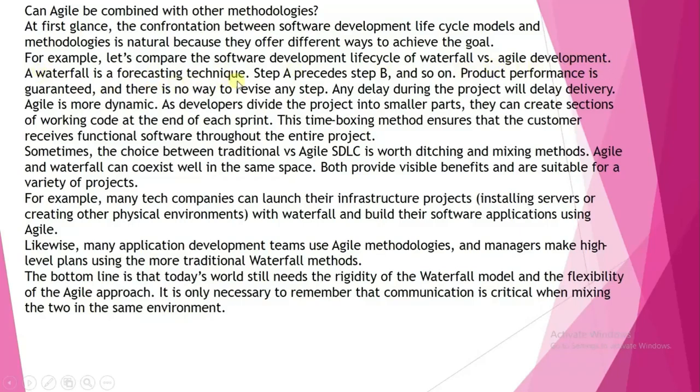Waterfall is a forecasting technique. Step A precedes step B, and so on. Product performance is guaranteed, and there is no way to revise any step. Any delay during the project will delay delivery. Agile is more dynamic. As developers divide the project into smaller parts, they can create sections of working code at the end of each sprint. So this time-boxing method ensures that the customer receives functional software throughout the entire project.